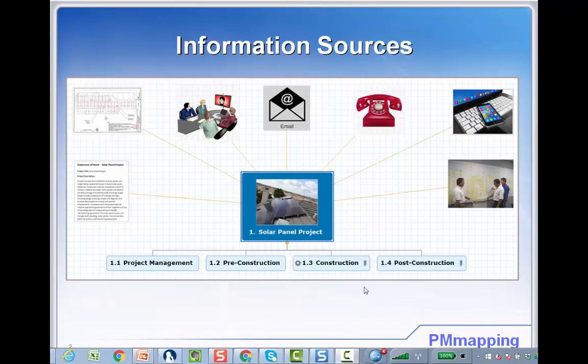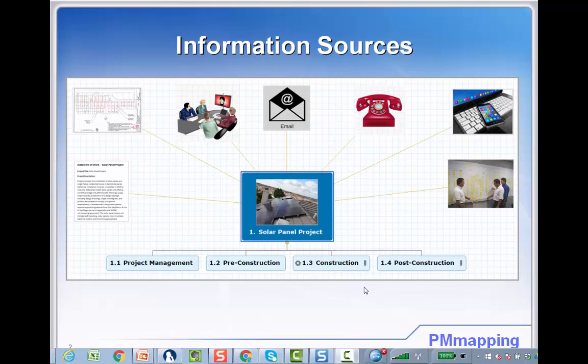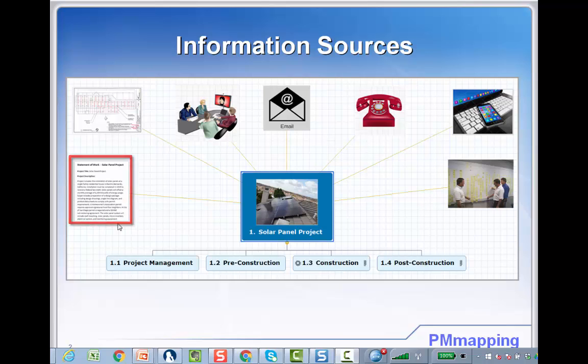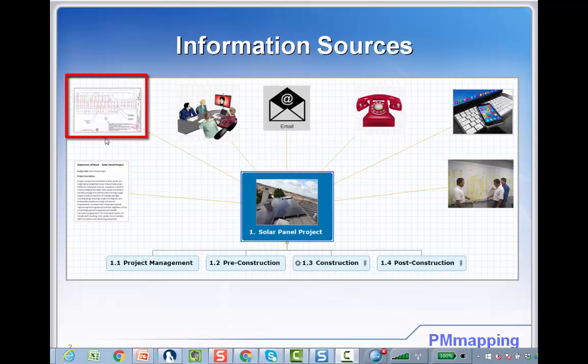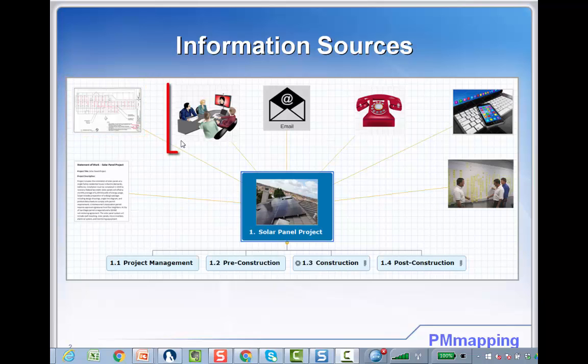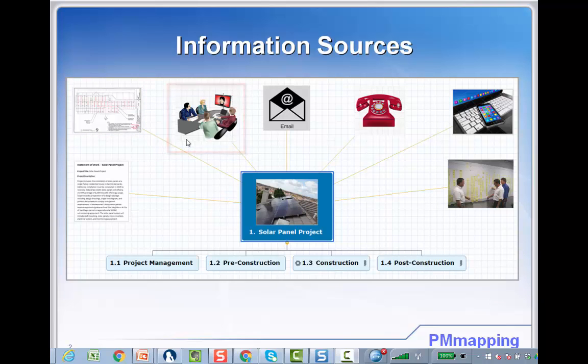Mind mapping software is an excellent tool to capture the information sources and scope inputs. For example, you could analyze a statement of work that's associated with an RFP. If it's a construction project, you can review the drawings and add deliverables to the WBS. Follow up meetings with subject matter experts. You can populate the mind map.